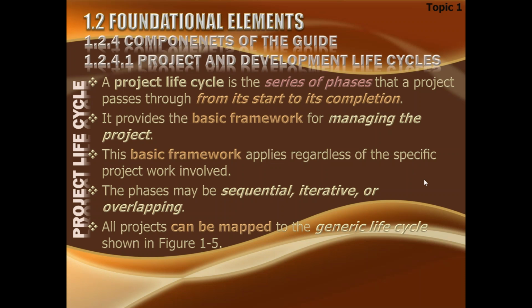You can have a single phase, but that is not advisable, because a single phase means that everything is overlapping. All the activities are confusing. So why are we trying to divide a project into phases? So that we have short successes. If I have 5 phases, I have 5 points to gather my wits and see what I have done and how I have done, and I can move ahead then. So 5 stop points, or 4 or 3 or 2, whatever number of stop points you want to have, will give you quick successes. You will have some achievement at the end of each phase, and that will encourage you to move ahead, and you can also show progress to someone.